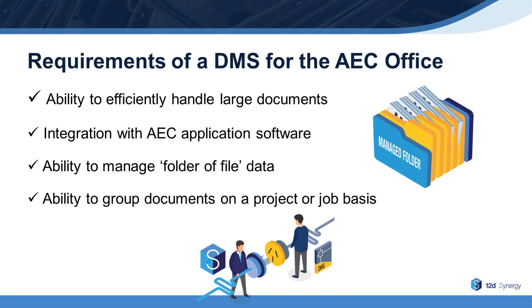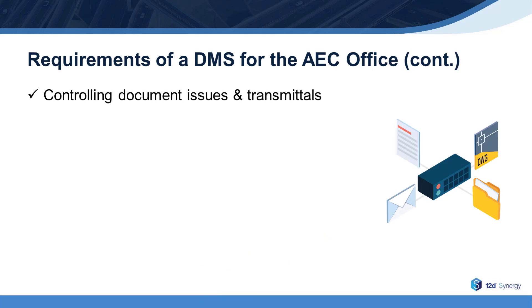The ability to group documents on a project or job basis: the typical AEC office manages work on a project or job basis, so the DMS should also be able to classify and group documents in the same logical categorization. Controlling document issues and transmittals — the issuing of documents in an AEC office is a managed process because the publication of documents has legal and financial implications. There should be a register of who issued the documents, which version was issued, who received them, and why and when.